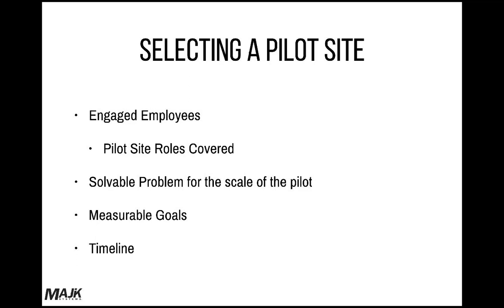You also want to identify measurable goals off the bat with the pilot and create a timeline and a mechanism to say, if we hit these goals within this time frame, we are going to be moving forward with larger projects on that time frame.